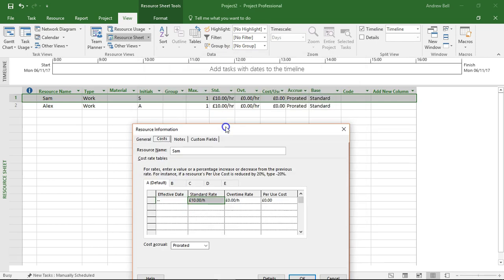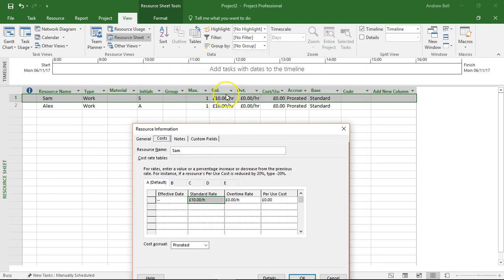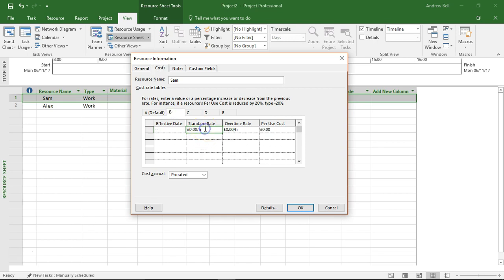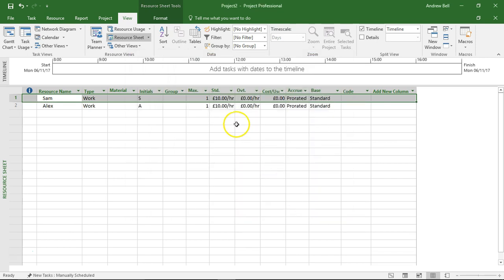Now the default cost that I put in here was £10 an hour, and so the default table rate A is £10 an hour, and what I'm going to do now is make table rate B £50 an hour.